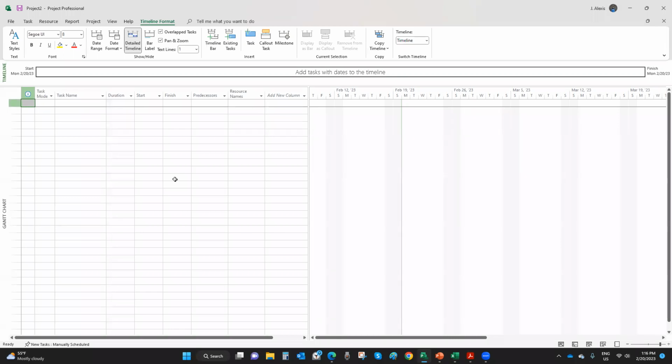You need activity durations, how long things will take, and obviously the relationships among those project activities. Once you enter this information and durations for your project activities, Microsoft Project gives you an estimate of when your project will end. This is called forward planning. Forward planning means I have a start date and I feed the software with some information, and it gives me an idea of when my project can end.